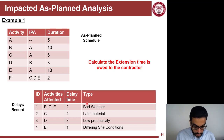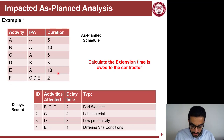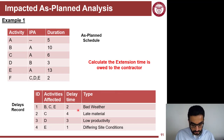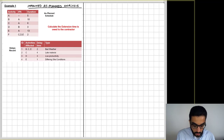Now let's work through this exercise on the board. We have six activities A through F. We're given the immediately preceding activities (IPA) and the duration of each. A is the starting activity; B, C, and E depend on A; D depends on B; and F depends on C, D, and E. We also have a record of delays with the type of each delay and its time impact.